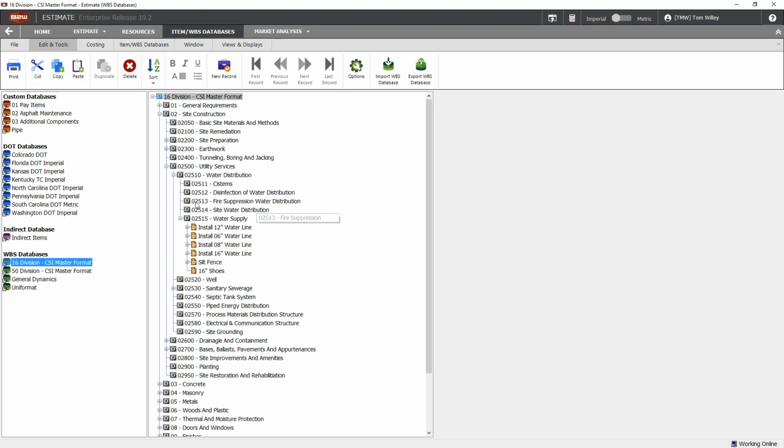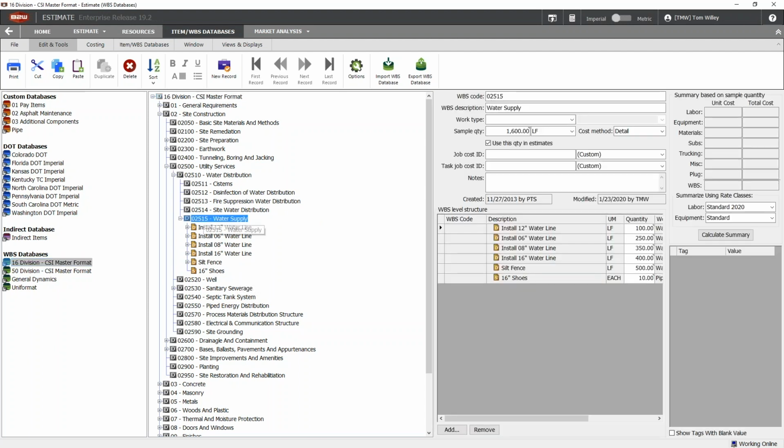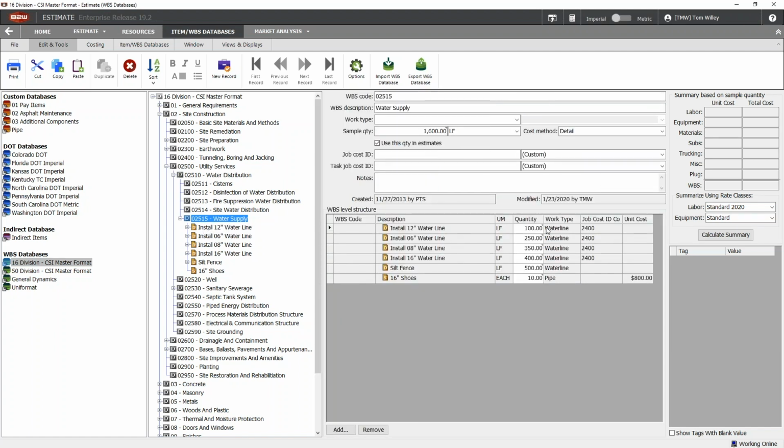The specific feature that we're going to show you here that really can help you drive more powerful templates and leverage what it can do is a summation feature. So what summation allows you to do is, rather than have the parent drive the quantity of the children, it actually allows you to do the reverse.